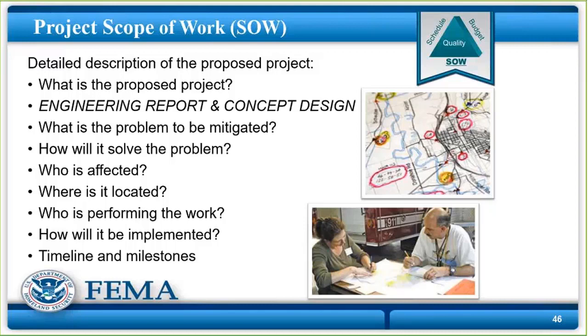I know that sounds like, well, we're going to hire a contractor and they're going to come in and build it. This is more related to the timing and the milestones below. Well, we're going to do the site preparation in November, and then we're going to cover it with a tarp because we don't want it to be damaged during the rainy season.